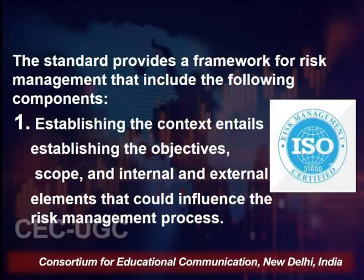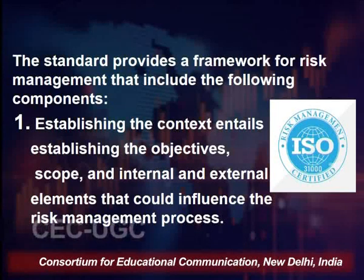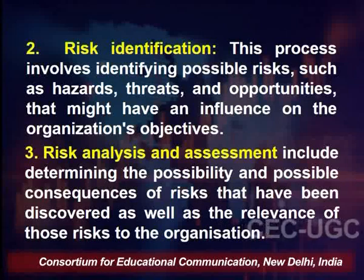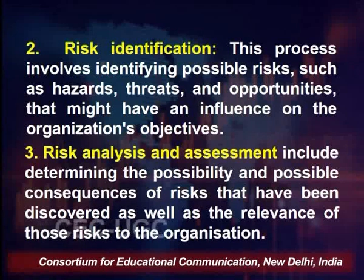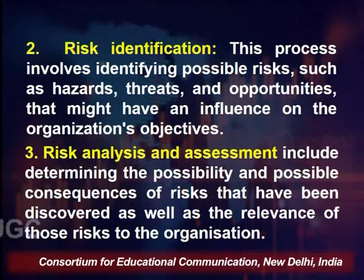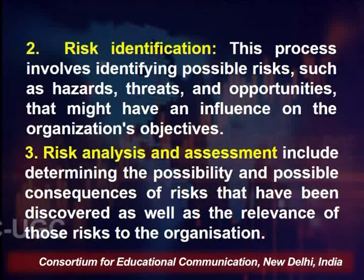The standard provides a framework for risk management that includes the following components. The first is establishing the context, which entails establishing the objectives, scope, and internal and external elements that could influence the risk management process. The second is risk identification, which involves identifying possible risks such as hazards, threats, and opportunities that might influence the organization's objectives. Next is risk analysis and assessment, which includes determining the possibility and possible consequences of the risks that have been discovered.